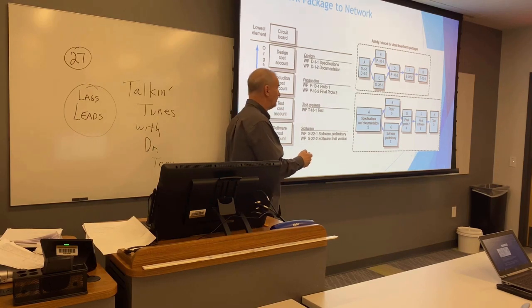But if I decide to start this on Wednesday and not work on Tuesday, it only takes 1 day. Do I have a problem? No, because it needs to be done by Thursday morning, right? Along with this one. You understand? So the latest start on this one is Wednesday. The earliest start is Tuesday. Everybody got that? That's what I'm talking about here. That's what you're going to see in a minute.